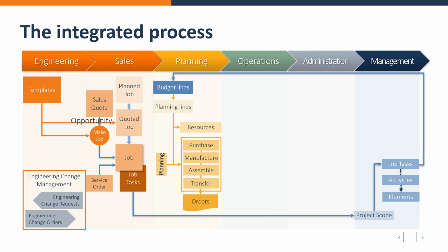Management continues to define that, and then they start putting in what we call budgets for the job. The more time that's spent on budgets, from our experience, is better from an overall understanding of the full scope of the project. So budgets are an important detail to add to projects. Once budgets are added, they usually become static as a baseline to understand what your budgeted costs are versus your actual. Then you see now we're moving down into the planning phase of the project.